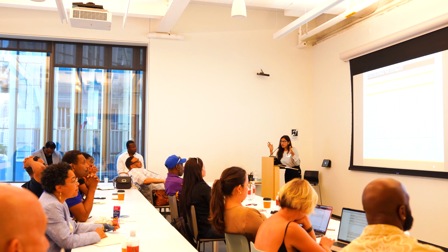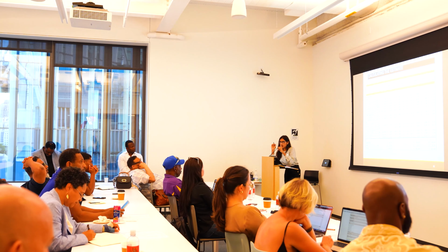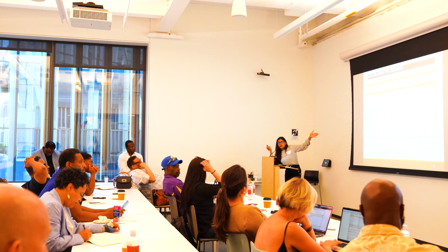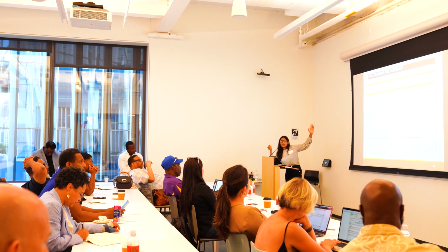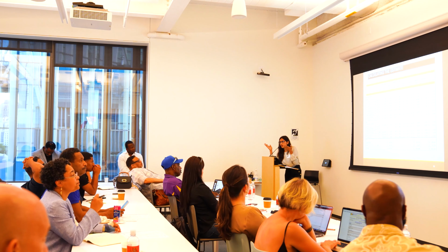Now, moving on, the next section is the labor section. In my first column, that's productivity. Productivity is how long it takes the labor to do a unit of something, like 1 square foot of tiling, or 1 square foot of ceiling, or 1 linear foot of piping. I just want to know how long it takes for one. And why am I doing that? Because I want to use this template multiple times. Today I have 200 linear feet. If tomorrow I just delete this and make it 400, I don't have to do the math again and again. I just put in 400 and I'm done. It's going to calculate for me, and all the formulas are in there.